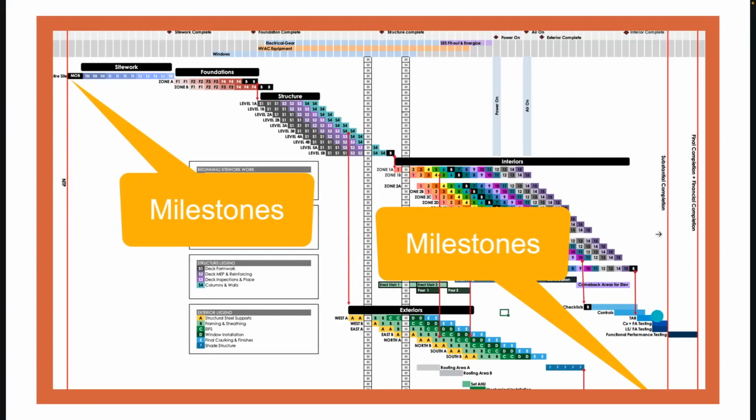Now, you will have a substantial completion date typically in a project. You will also have a final completion. So substantial is when typically your building is ready to occupy, it's safe, the life safety systems are complete and signed off, it is ready, and it is finished and usable for its intended use. There is an owner's punch list.